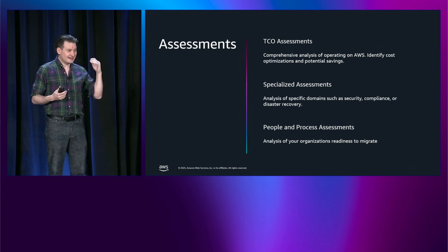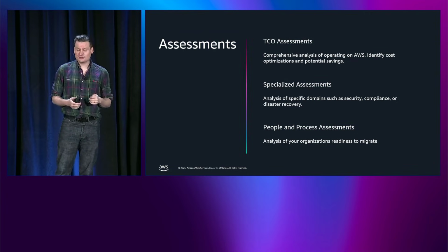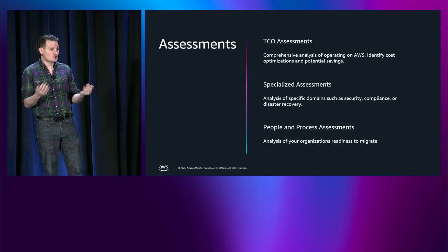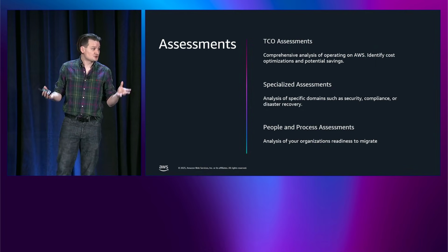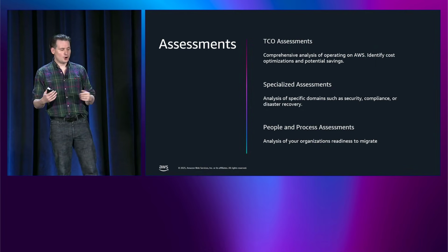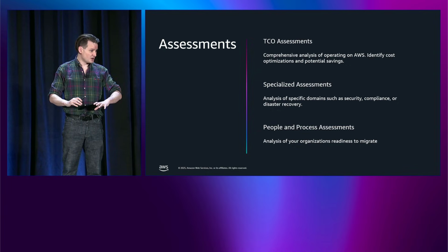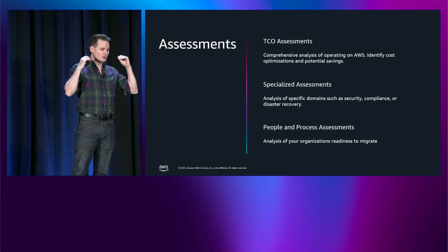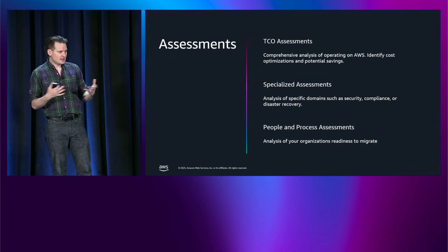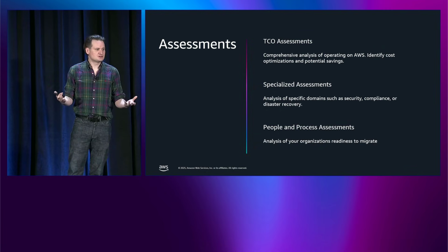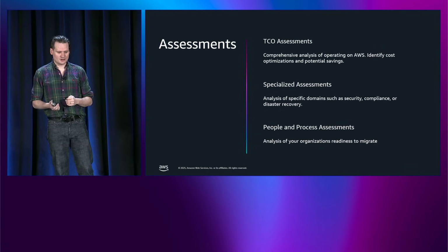When we see costs exceed expectations, or simply costs are not managed and there is no baseline expectation, that creates risk for the migration. So performing a TCO assessment to understand those costs and then to track them throughout the migration is indispensable. It's an essential component of every migration.